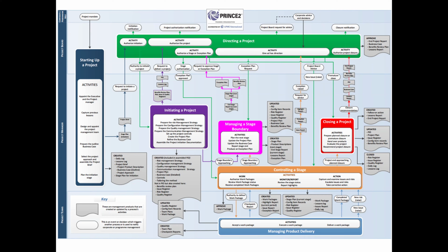When you look at the output of each of the other stages, the PID is a living document, because inside the PID is the project plan, and inside the PID is the business case. One of the outputs of managing stage boundary is an updated PID. One of the outputs of closing a project is an updated PID as well. So as a project progresses, you have to keep on updating your PID as you go. That is very, very critical.